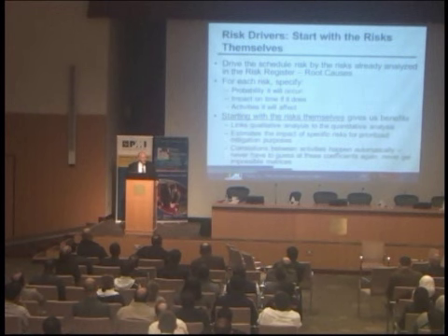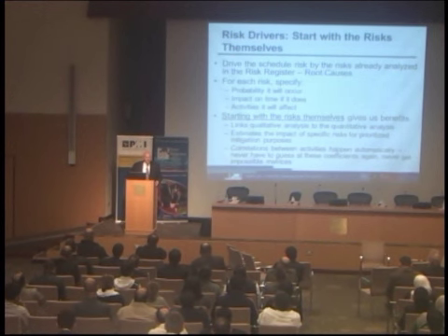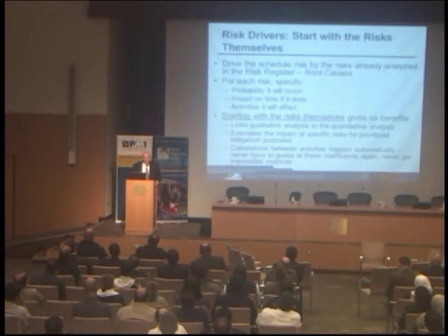These risk interviews, when you're talking about risks, there are like 30 risks you start out with, or 20 risks. You may build it up to 35, and then you whittle it down to eliminate the duplicates and things like that. So you end up with 25 risks for a big project. I mean, I had a $10 billion refinery project in Saudi Arabia. I happened to be able to do this analysis in Houston, Texas. We ended up with 780 activities in the schedule, summary schedule, and we had maybe 30 risks for a $10 billion project, or a nominally $10 billion project. It never was actually, it wasn't built, at least not by ConocoPhillips. But some of you may be involved with it.